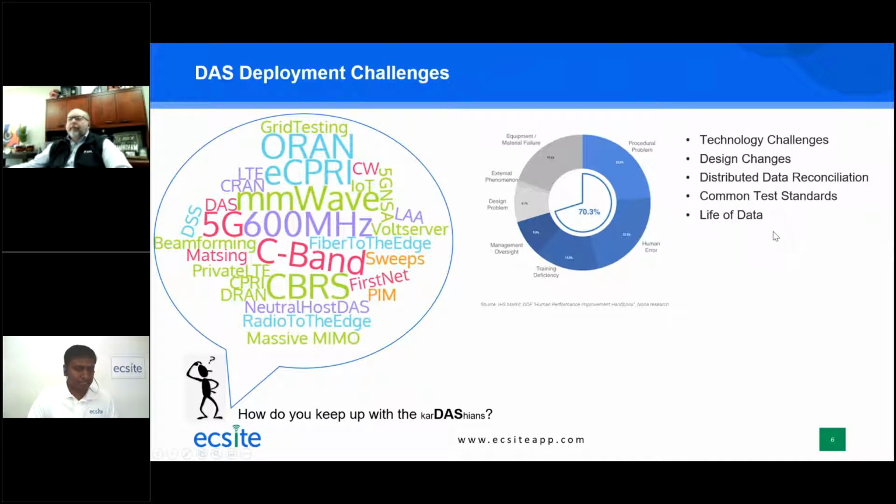we have technology challenges, right? We have to understand what this technology does, and a ton of time we see design changes, right? We've done over about 150 DAS projects. I would say about 30% of them have had at least 5 or more substantial design changes. And when I say that, not just moving a remote here or there or changing cables, changing jumper types, but from when we get the 70% or 80% design, they say it's ready to go and the contract has been awarded, to when it finally gets implemented. And even during the implementation phase, we see changes.